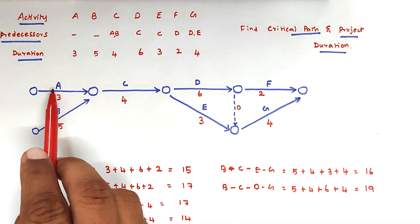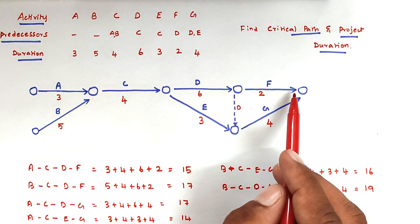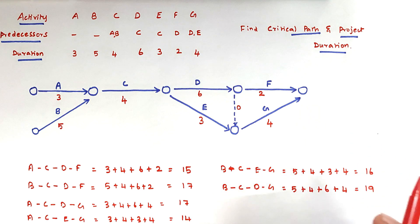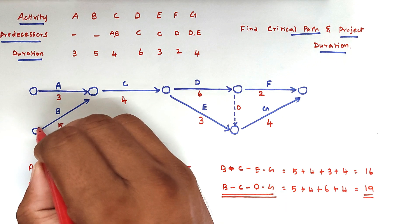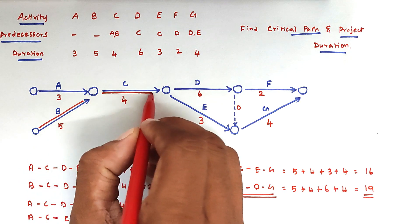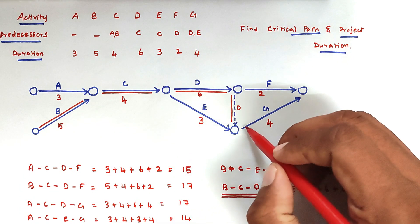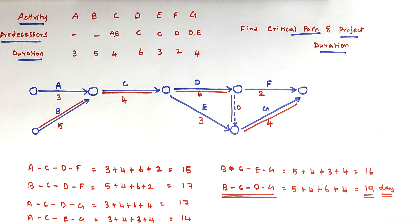So there are 6 paths in total. We know the critical path is the one containing the maximum duration. Here the maximum duration is 19, so the critical path is B, C, D, G. The critical path duration, or project duration, is 19 days. This is the method we can use to solve the problem. We will see more in the next video. Thank you.